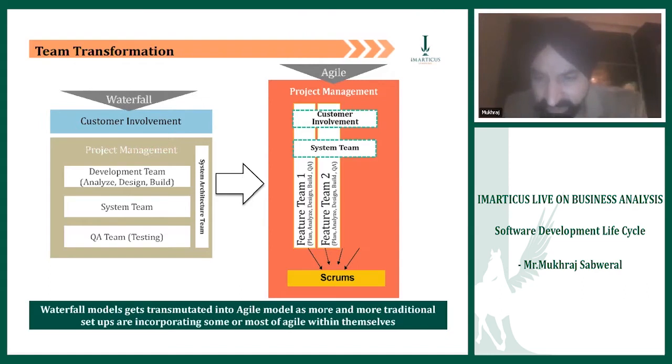Okay, Sumit says what is entry and exit? If you see the end-to-end space, then the business analysis we did in the beginning is the entry criteria. For entering into an SDLC, you must have some requirements. Exit criteria is when you deploy that to the client product. You have gone through complete testing and passed all the test results, and the exit criteria, frankly, is the UAT, which means the user acceptance test as well.